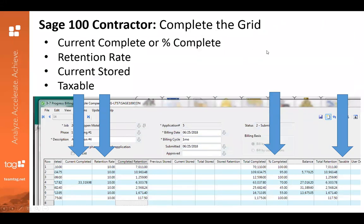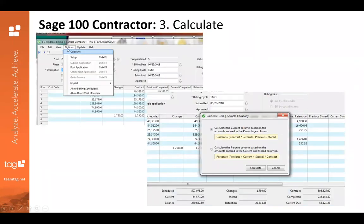Then you'll complete the grid. You'll want to enter either current complete or percent complete. If the retention rate that you put into your original setup is not the rate you'd want to keep, you can edit that here. You'll also enter current stored and whether or not it's taxable. Then head back up to Options and hit Calculate — it will give you two options for calculating that grid, and you'll pick one and move forward.